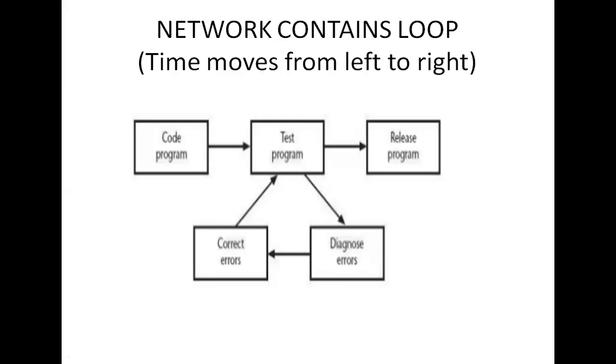Loops cannot be directly represented in a project network. If you know the number of times you expect to repeat a set of activities, then we can draw them in a sequence, repeating them for the appropriate number of times.